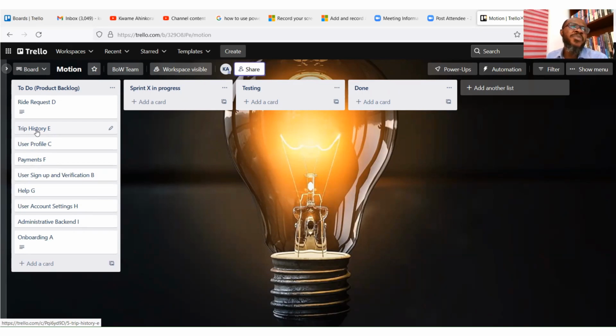How long will we be releasing? What will be the duration of our sprints? Now, it's important that the team keeps a steady pace. That is why we do these time box elements, especially in Scrum, so that the team can keep a steady pace. So maybe for our rules, our sprint will be for 2 weeks. Let's agree that our sprint will be for 2 weeks. So each moment, the team will be working within a 2 week sprint in order to deliver the objectives of that sprint. Once this is done, our project has been initiated.